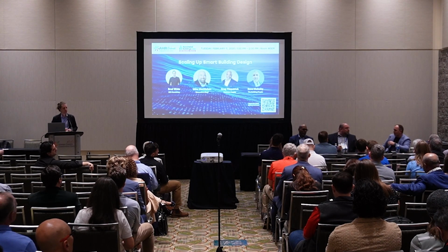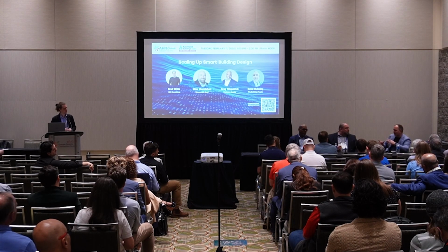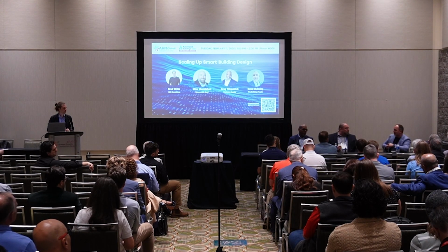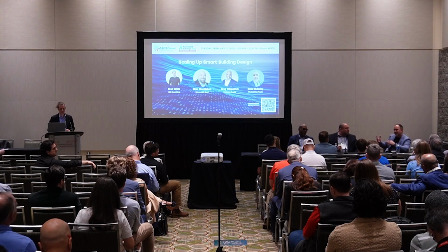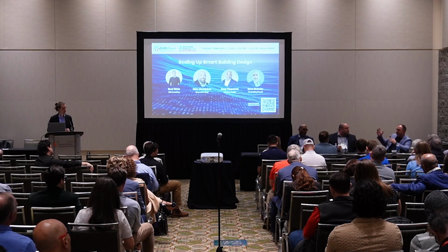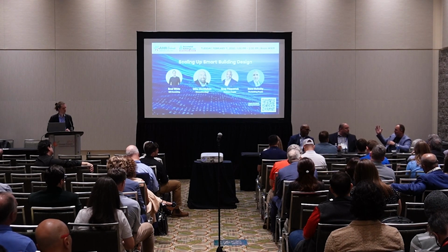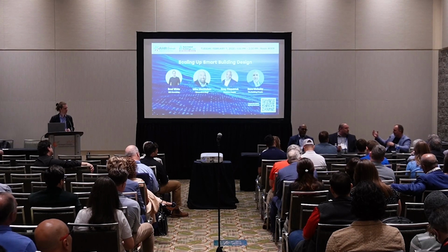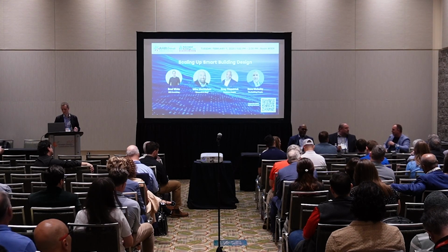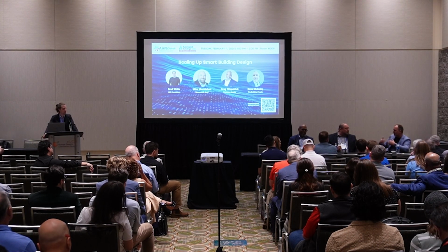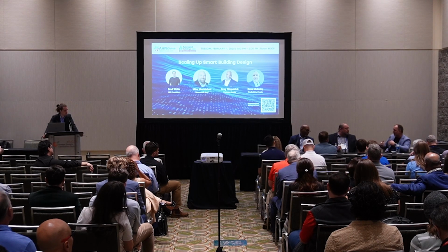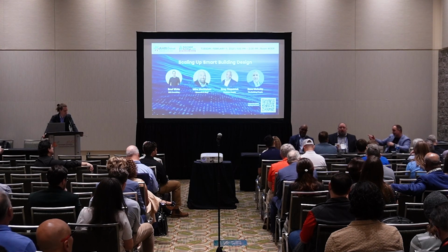I totally agree. I don't know how many projects I've been on where the maintenance FM team, at the end of the day, goes to a VAV box, just a perfect example, and the cover is up against the drywall. There's no way to change a filter on a fan power box because the design team never thought through the operation and maintenance of that building. Or commissioning. Or there was no commissioning, right.